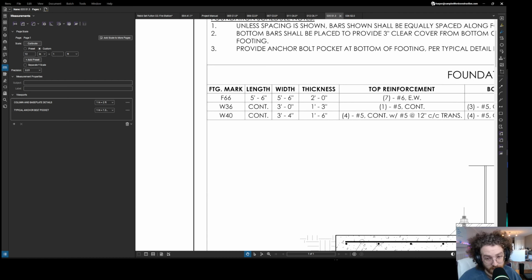And we were going from cubic feet to cubic yards. So we divide by 27, we get 2.2, and we're going to times that by 1.2 because we always factor in 20% for waste when you're dealing with concrete. So that would give us 2.68. And we always round up because they don't sell cubic yards in fractions. So if it's 2.68 cubic yards, it's now 3 cubic yards.